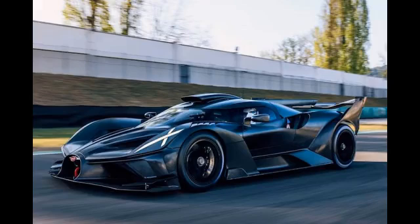Red bar extends beyond the maximum limit. Income data bar might be short of the goal. Green bar doesn't reach the maximum limit. Action. Larry Jeffers Race Cars might need to delay non-critical parts purchases or reduce marketing spending in June to stay within the budget. Scenario 2, buffer month.